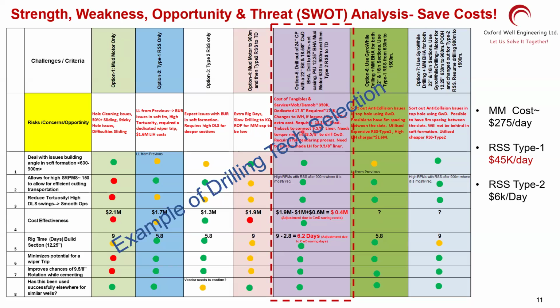Achieving everything. For example, in this kind of hypothetical case, it's not hypothetical, it's a real case from somewhere, but I made it anonymized. So you can choose one of them: all green, most of them green, and some risks are quoted, explained. Can you deal with the risk? Yes. Do you have a mitigation plan? Yes or no. Then you have a winner.